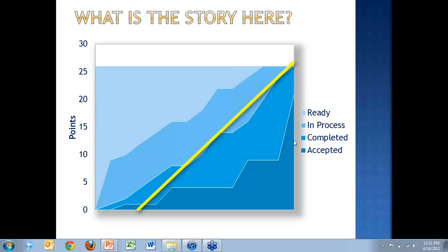Now you expect me to believe that in these 2 days, you accepted 20 points worth of work and actually reviewed it? I don't think so. This is a big, serious anti-pattern. I look at this kind of slide, and it makes me need to go talk to the product owner. Even before they don't show up for the demo or anything like that, you look at this slide and see this pattern, and you can know that you have a problem with the product owner not being engaged.